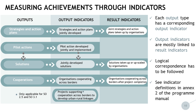If we stay with the same example, the result indicator is joint strategies and action plans taken up by organizations. This logical correspondence is to be followed. I would like to highlight one element which is a bit different: the pilot actions. The pilot actions, in terms of output, lead to the output indicator of pilot actions developed and jointly implemented. However, as explained before, solutions should derive from the pilot actions. Therefore, there is no direct result indicator related to the pilot action. Instead, the pilot action feeds into the jointly developed solution, which is again an output and an output indicator, covered by the result indicator of solutions taken up or upscaled by organizations.